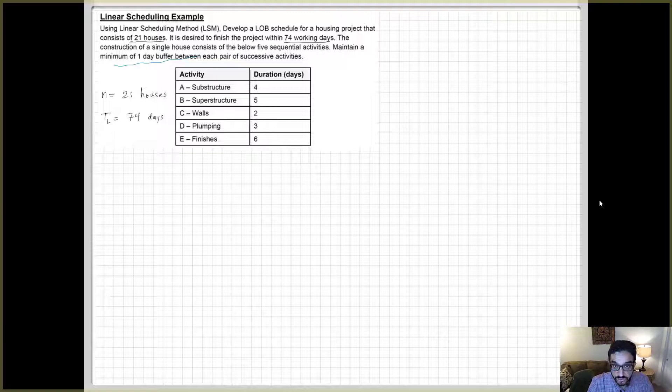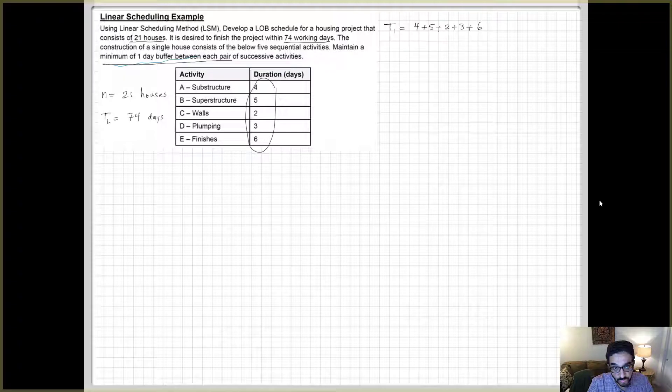Like we learned in the lecture, we first need to calculate what we call T1. T1 would be the total CPM duration of one unit, how long one unit would take. So we have five activities, we add the durations, and most people do that and they forget about the buffer between these activities. You have five activities, so there are four buffers between them. So total now, each unit, if you do these activities back-to-back with the buffers, it will take 24 days.